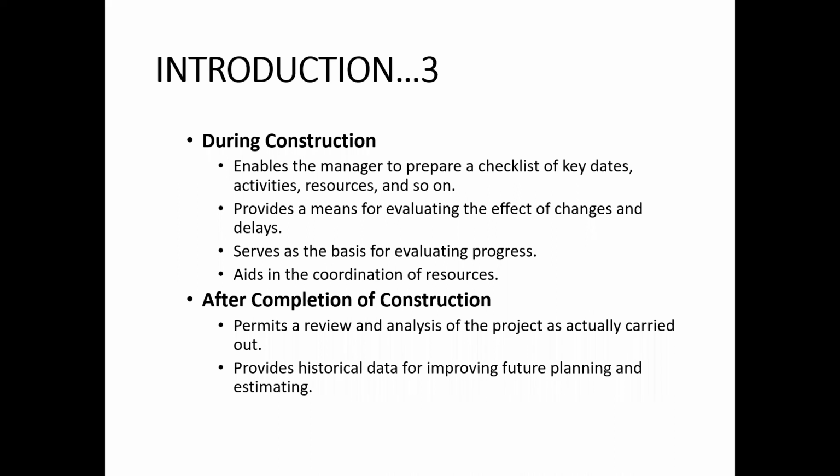In the past, if a certain activity has taken, say, 3 weeks, it is more likely that a similar activity in a new project may take proportionately the same time, depending on the size of the project. So the duration of the activities and the resources used on the activities, if that information is captured from the previous project, can be useful for future projects as well.